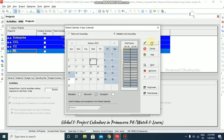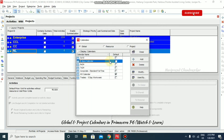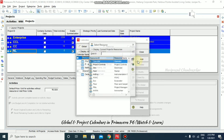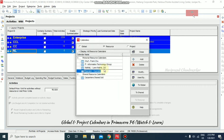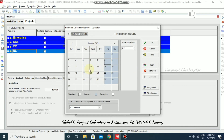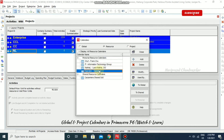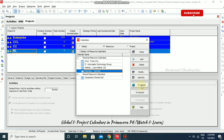Click OK to save the 6-day calendar in the Global pool. You can also go to Resource and create a new resource calendar — for example, an 'Operator' calendar. Click Modify to update its name and details. If you want to convert a resource calendar to a global calendar, select it and choose Make Global. Confirm the conversion and the calendar will appear in the Global pool.